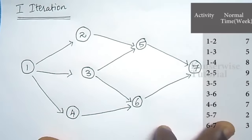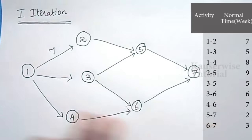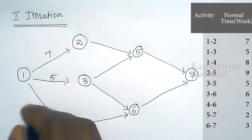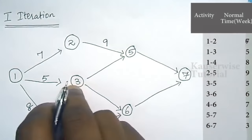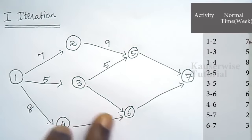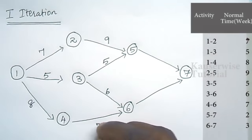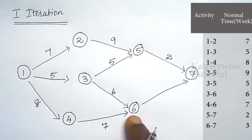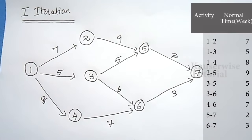This is the network diagram for the given activities. The first activity connects node 1 to 2 with duration 7 weeks. The second activity connects node 1 to 3 with duration 5 weeks. The third activity connects node 1 to 4 with duration 8 weeks. The fourth activity connects node 2 to 5 with duration 9 weeks. Activity 3 to 5 has duration 5 weeks, 3 to 6 has duration 6 weeks, 4 to 6 has duration 7 weeks, 5 to 7 has duration 2 weeks, and 6 to 7 has duration 3 weeks. This is the network diagram under normal conditions.